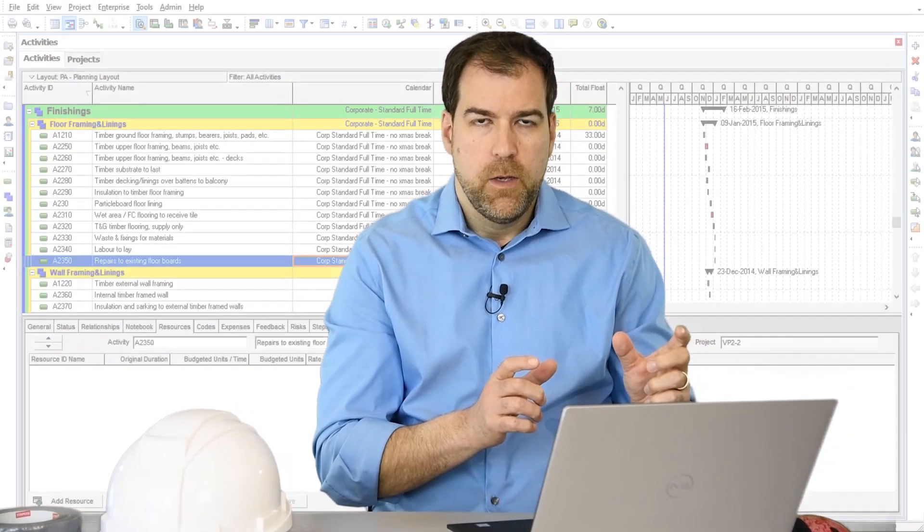They're trying to look at the information below and summarize it. And it also tries to summarize the calendar. Figure out what calendar is used below and it puts the name of that calendar there. It doesn't mean that we've assigned a calendar to the work breakdown structure.